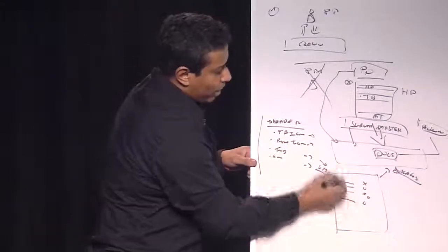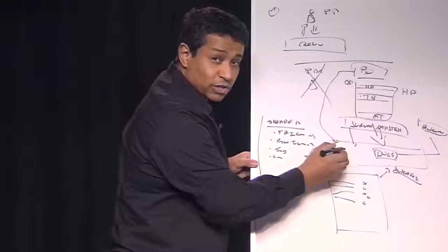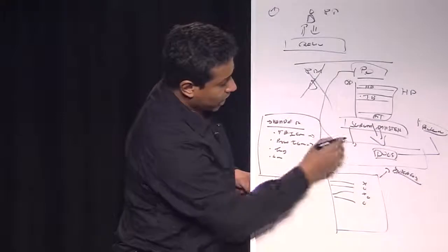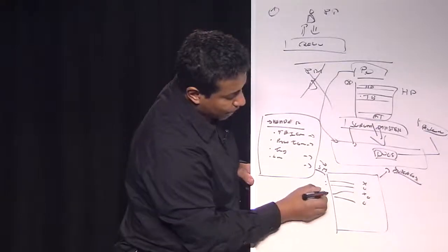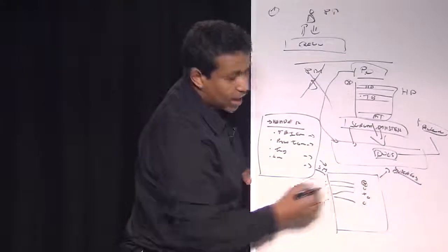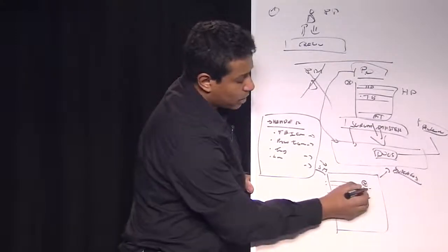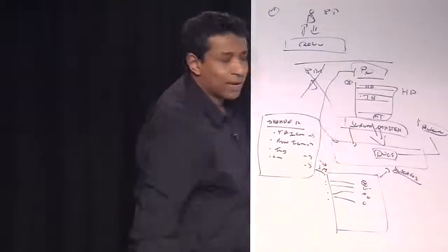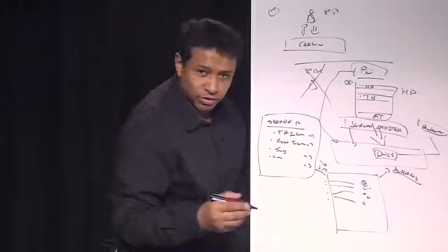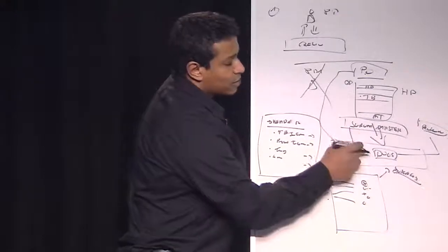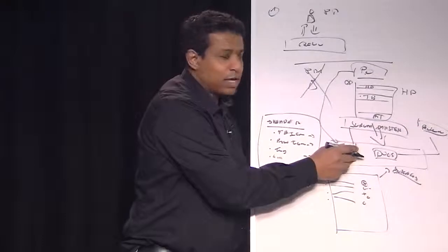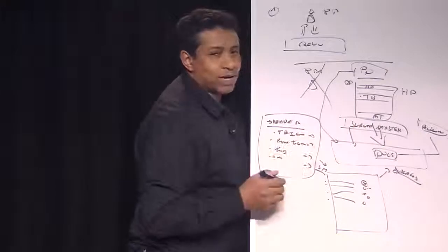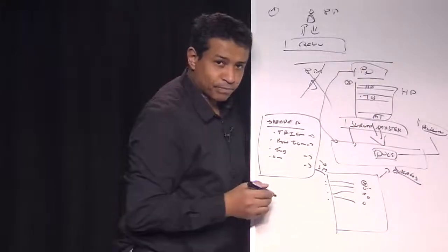And right after, he comes to the dogs to tell them that, okay, this is what we have to do in details, step by step. And I've been telling you that I told the product owner this won't be possible, I told the product owner we can do this. The dogs discuss with the Scrum Master and say we agree or we don't. The Scrum Master can be moved any week, any month. The dogs choose their Scrum Master, not the PO. This is a major rule.